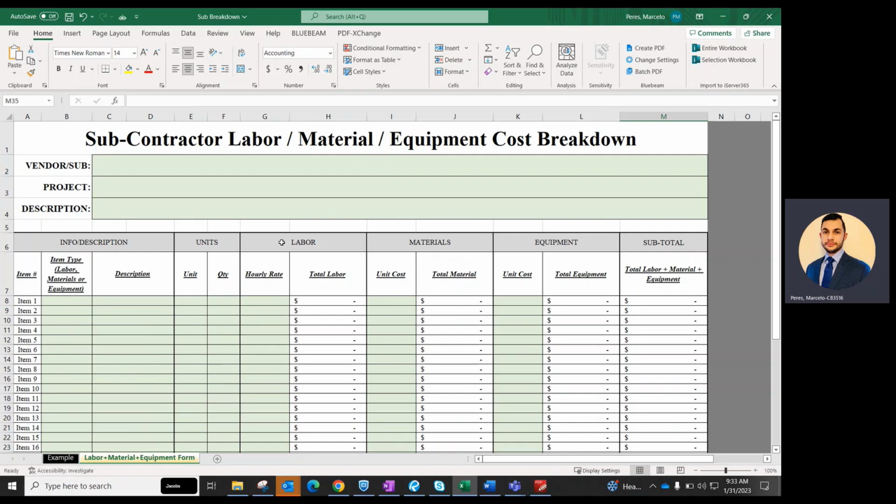So again, this is just an additional layer of accountability where the general contractor now has the opportunity to fill this out, double checking the subcontractors' proposals, making sure they're in compliance and free of errors. And the requirement is one form for each subcontractor. Therefore, if a proposal has 3 subcontractors working on a specific task, 3 of these forms are needed. They need to be neatly organized with its associated backup. This is common sense. So let's get started.